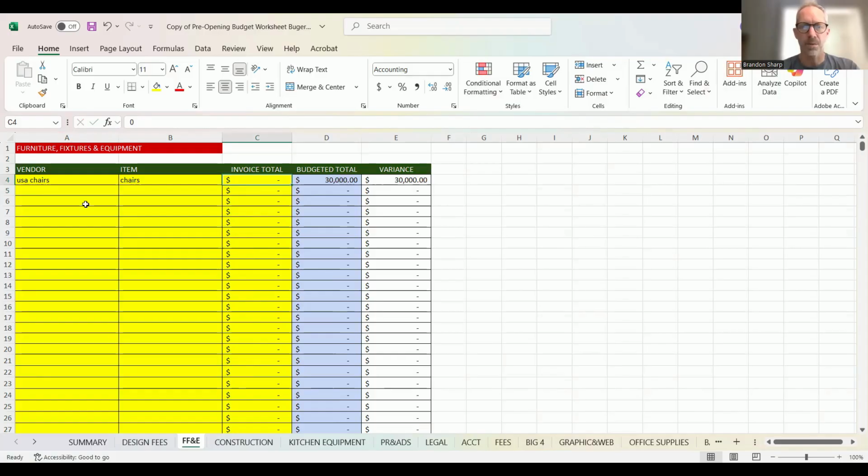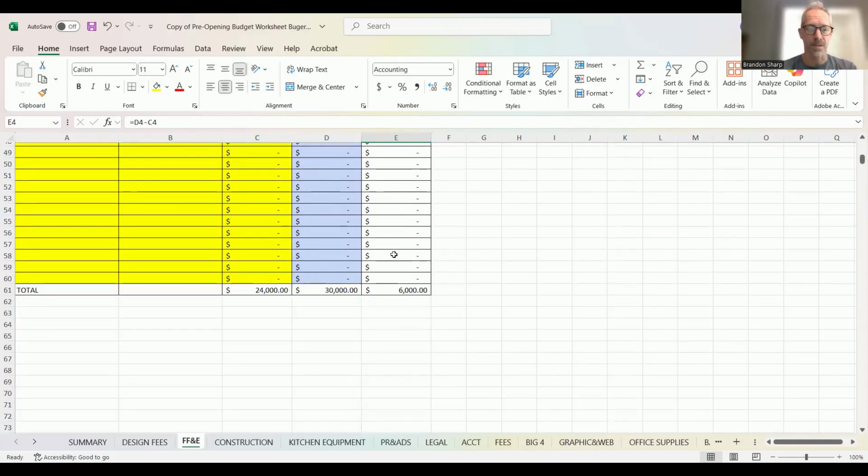But your designer is able to get a designer discount, a nice guy discount. So these came in at only $24,000. He got a 20% discount. Amazing. So your variance is $6,000 to the good. You save 6,000 bucks to budget on chairs.